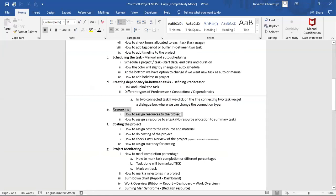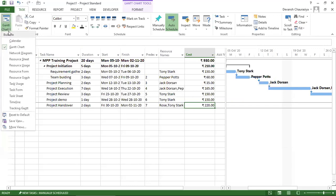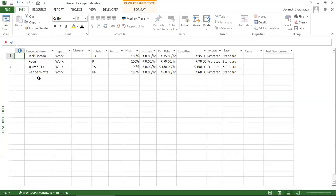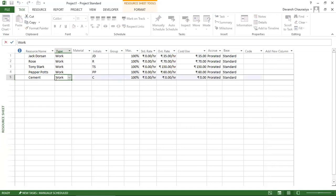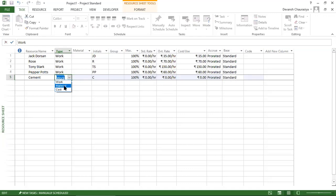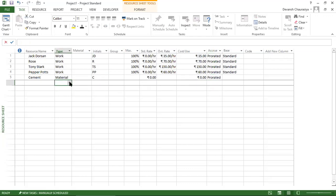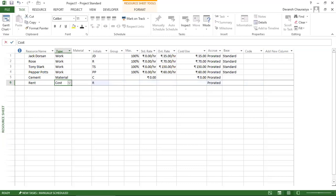In the Resource Sheet you can also add material resources — for example, cement as a material type — and cost resources like admin cost, fixed cost, or rent. These are assigned to tasks just like human resources to track non-labor project costs.